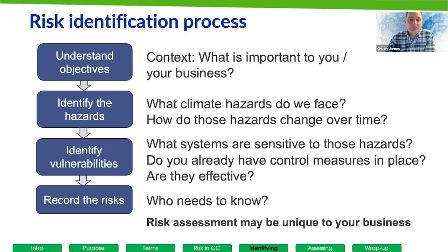So we're essentially following this 4-step process here. What hazards do we face? What systems are sensitive to those hazards? What control measures do we have in place? Are they effective, and who needs to know?